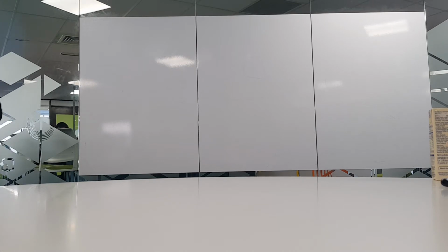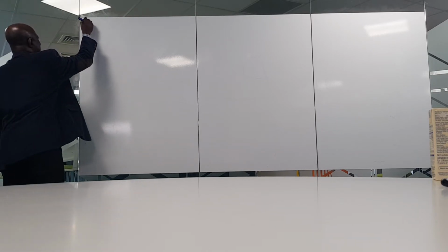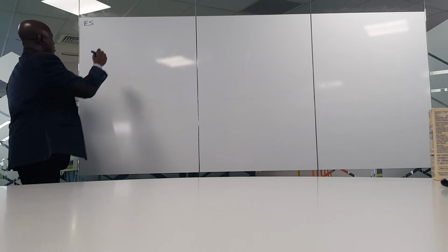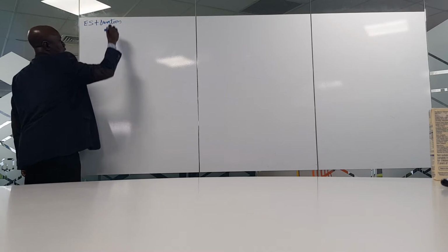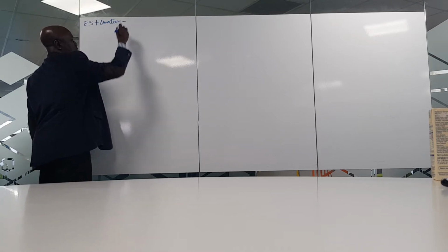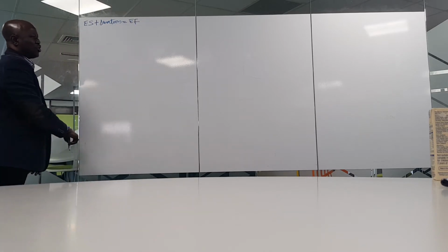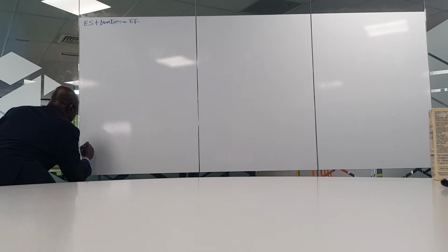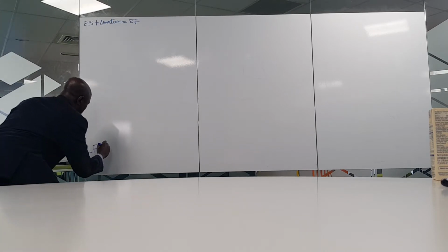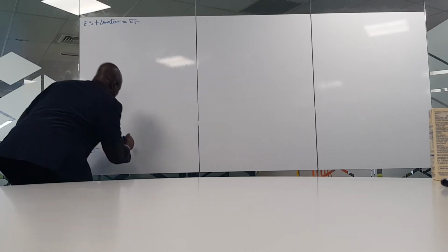We're going to work on the forward pass rule, which is going to use early start plus duration equals early finish. And I'm going to write down here, we work the backward pass, which is going to be late finish minus duration equals late start.